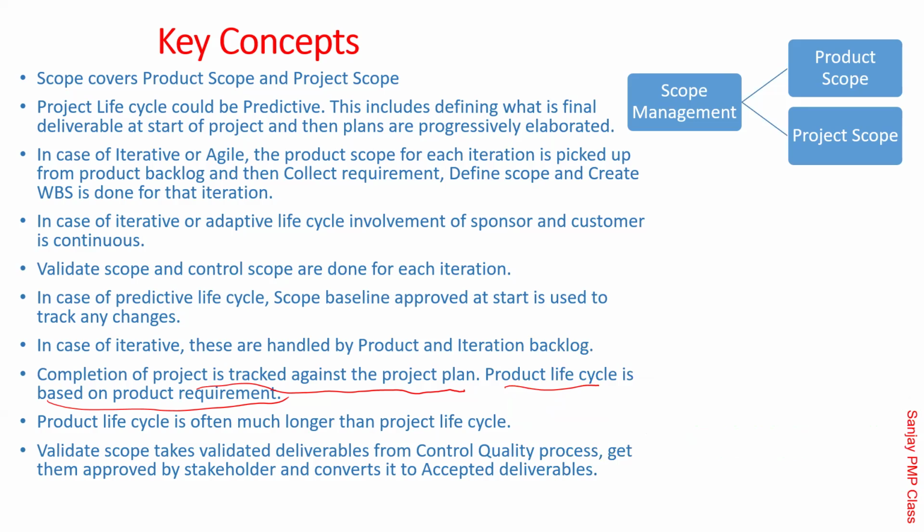Now, what happened is that when she was trying to do that, the quality guy comes back and tells Vishakha, you can't go. You have not completed the project. She said, what are you telling? See, this was the list of the deliverables I have given to him. They have accepted it. What remained, Vishakha? UAT. Project closure cannot happen without user acceptance, Rajnish.